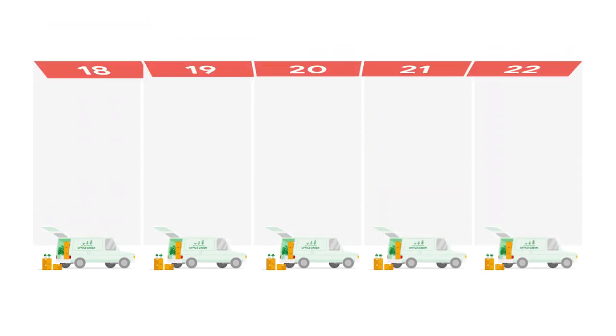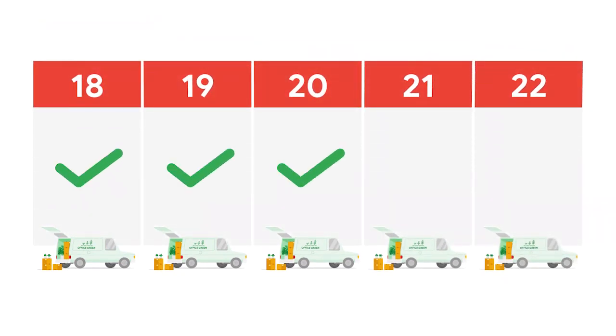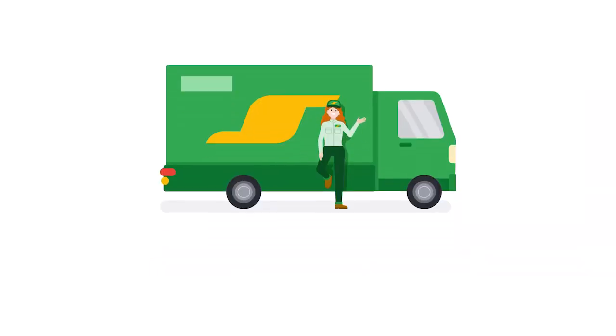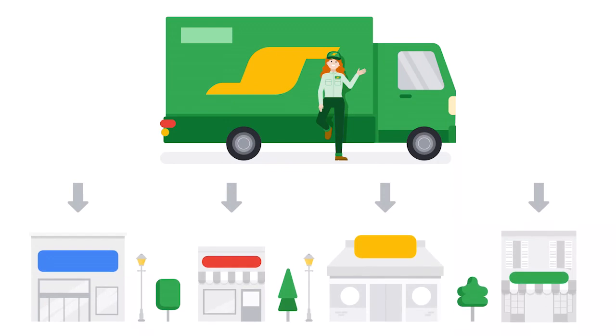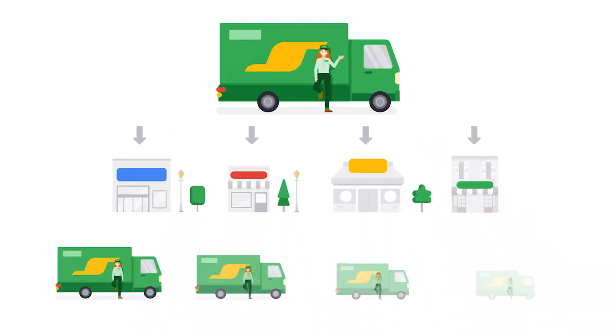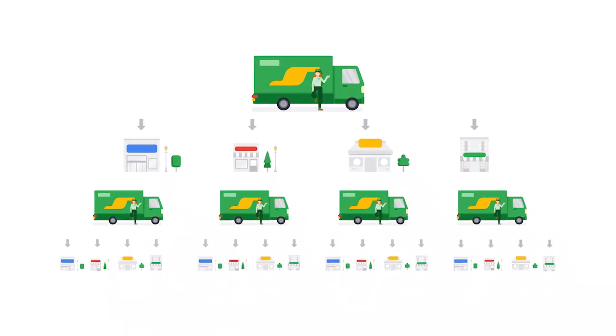During this process, you might find that you need more resources to speed up the project timeline, like a second web developer or a third writer. Let's imagine capacity planning in the context of our Plant Pals project at Office Green. If you know that you'll need to deliver plants to 100 customers over a period of 5 days, then you'll need to determine if you've hired enough delivery drivers to meet that deadline. If one driver averages 4 deliveries within an 8-hour workday, then you know you'll need to hire at least 5 drivers to complete the work on time.